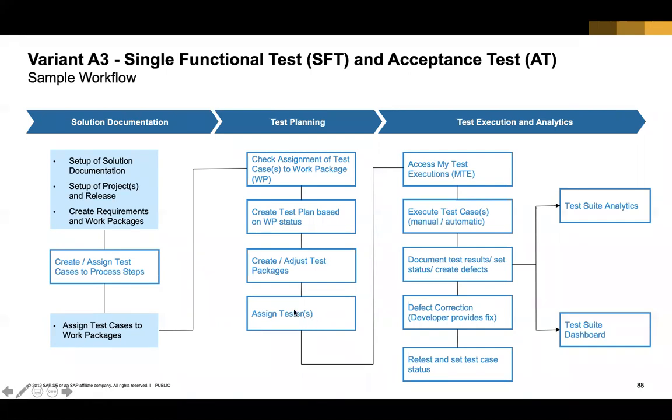And of course, once you create your test packages, testers will start to use the new Fiori app and start to do the testing, and then log the test results, create defects. And then if the defects have to be corrected with a transport request, then you create a defect correction. And then testers will retest and then finally set the test case to pass. And while all of this is happening, you as a test manager are using the test suite dashboard to track all these activities that are happening, either from a planning and preparation standpoint or from an execution standpoint, right? So this is the tester workflow.